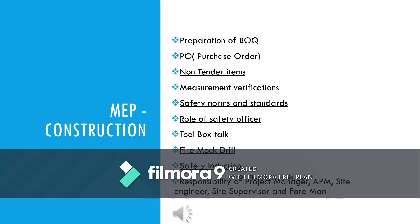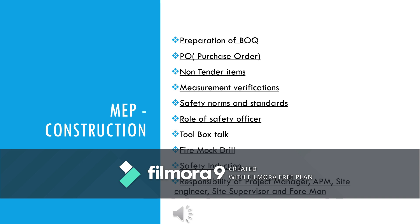Accordingly, we need to issue the purchase order. If anything is missed in the BOQ, it will be called a non-tender item, which will be used in the project at a later stage. Once the work is done, measurement verification has to be done. While doing the project, safety norms and standards must be maintained, a safety officer will be deployed at site, and you should know the roles and responsibilities. We need to conduct toolbox talks at regular intervals and safety inductions. I am planning to elaborate everything in detail — maximum MEP aspects of a complete building — for those who want to make use of it. Thank you so much.